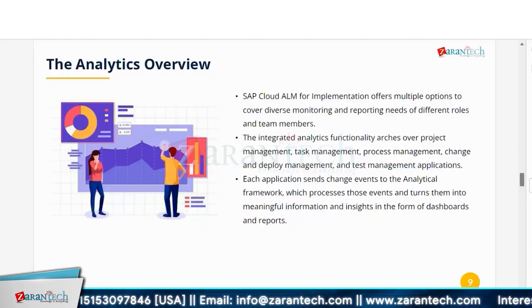If you have one test case and you keep running it, you give, when did we run it, for what purpose, at what time, right? You will not have that clarity, or you have to maintain it somewhere, that this test run we did on May for this purpose, this was the result, in Excel or in Word document, right? Everything you can do that in your Cloud ALM itself. It's just that you make that test case a part of a test plan.